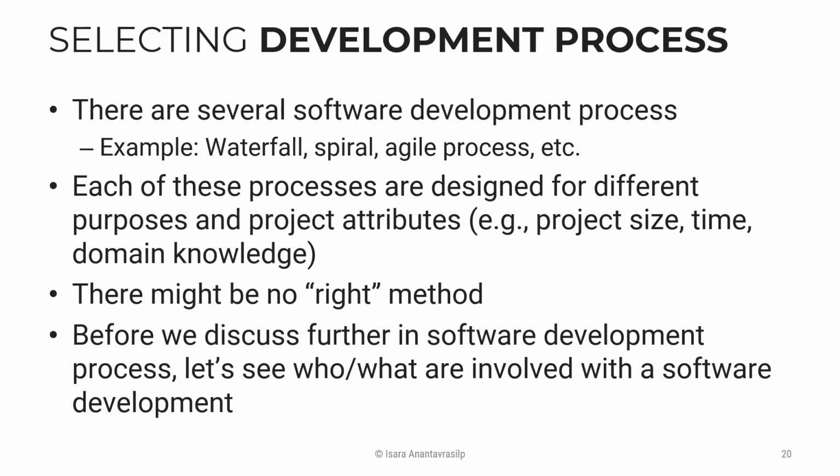Of course, with a project in a known domain, like when you develop software that controls space stations, or maybe the ground control station, then you don't want to change anything very much. You need to know everything beforehand. You have to invest a lot of time in requirements collection and designing before you actually start coding, because nothing can be wrong. All in all, there might not be one right method.